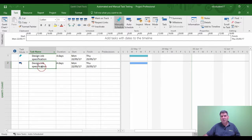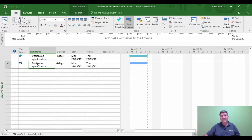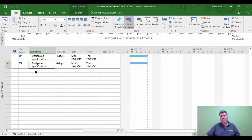If we look at task 2, which is an auto-scheduled task, how can I tell? The task mode has a little blue bar with a black arrow, there's a slightly darker blue bar for the task bar, and on the task tab we can see it's an auto-schedule task. Auto-scheduling takes away some of the flexibility of the task, but it links to Microsoft Project's automated controls.